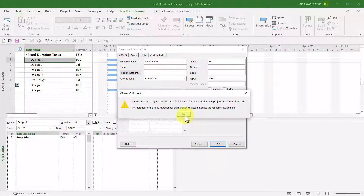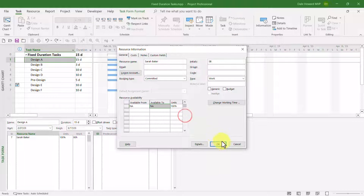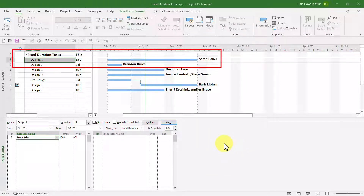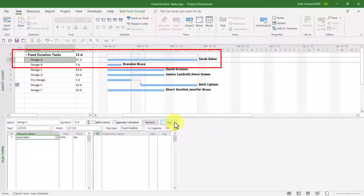I need to click the OK button, and then click OK again. Notice that Microsoft Project has changed the duration of this fixed duration task from 10 days to 15 days in response.